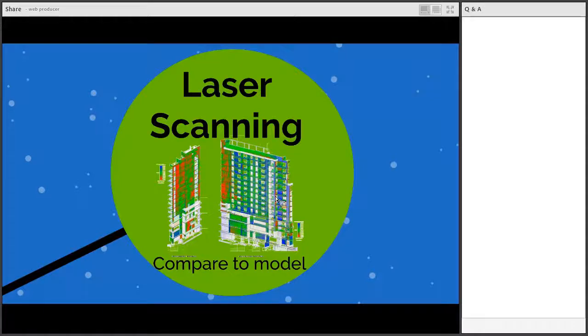There was discussion about whether the masonry was where it was supposed to be according to plan, or where the concrete walls were out of tolerance. And of course, the mason and the concrete contractor were both looking at each other like, my stuff's where it's supposed to be. So there was a scan done of the building, overlaid with the model, and this is called a heat map. What you're seeing is in blue locations, or light blue or dark blue, closer to the center of the building or away from the theoretical face, and in red, locations closer to the streets or further away in the opposite direction from where they should be in theory. And everything in green is within a half an inch of the theoretical location.